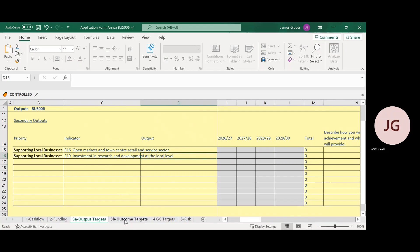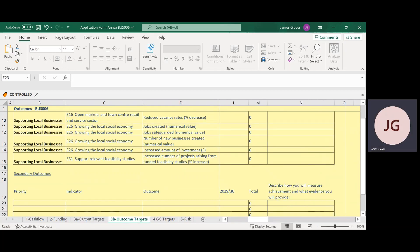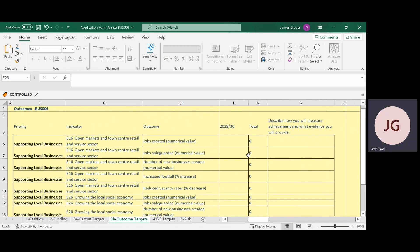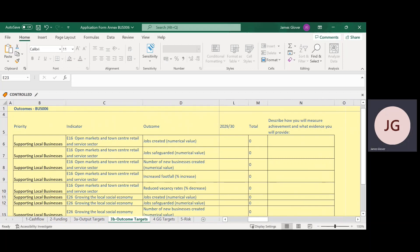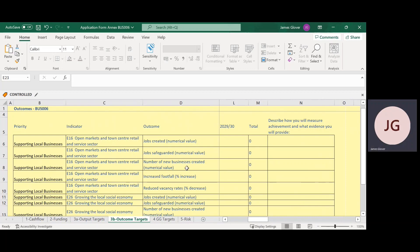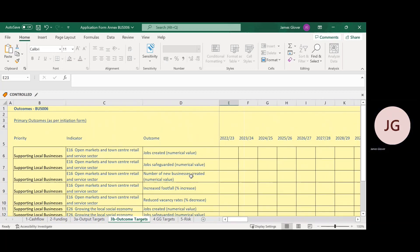Tab 3b, Outcome Targets. Outcome targets may be delivered during the project and afterwards — for example, jobs might be created a year after the project finishes, and the form allows you to capture that. Please follow a similar approach to the previous tab 3a, identifying and completing the primary outcome rows that are relevant to your project, including quantifying across financial years and describing how you will measure these. Please select the relevant drop-downs, again quantifying by financial year and providing detail on how you will measure.